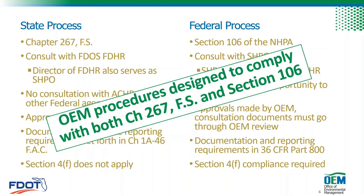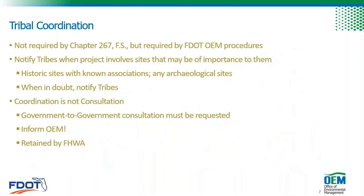The reporting requirements for the two regulations are different, but OEM has designed the FDOT procedures to ensure our process and deliverables meet the requirements of both laws. The cultural resources compliance process, implemented through the FDOT Section 106 PA, fulfills both the state and federal rules regarding historic properties. Chapter 267 does not explicitly require tribal coordination.